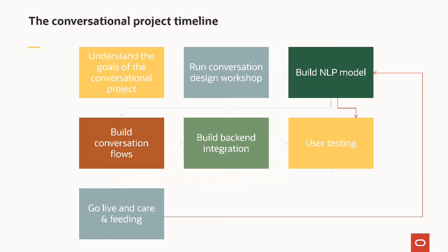Just to give you an idea of the kind of things we're doing in these workshops, we're defining use cases, right? Brainstorming use cases. We are assigning priority to the use cases. In reality, the business was doing that. We're just sort of guiding the workshop. Giving priority to the use cases, complexity of the use cases, the ones that have the most immediate benefit or the higher benefit.